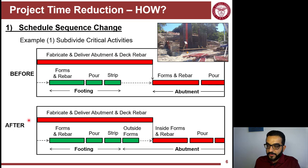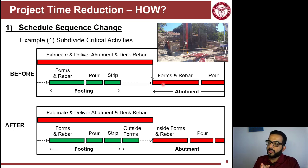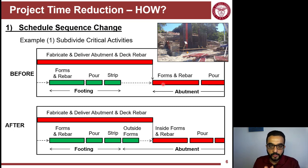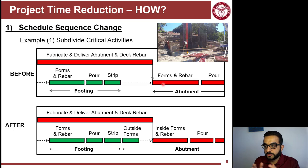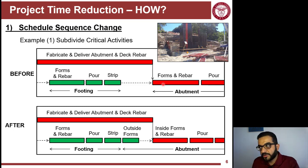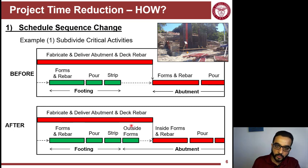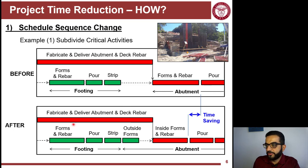Another way: this is a very long activity because you're fabricating and delivering both the abutment and the deck rebar. You're shop drawing and fabricating rebar for both the deck and the abutment, but structurally there is not much dependency between them. So why bundle them in one submittal and review package? Sometimes necessity drives splitting that into two packages so you don't hold the abutment rebar review waiting for the deck rebar, since the deck will be built in the future. Creating a parallel channel and splitting into two activities can squeeze the schedule further.